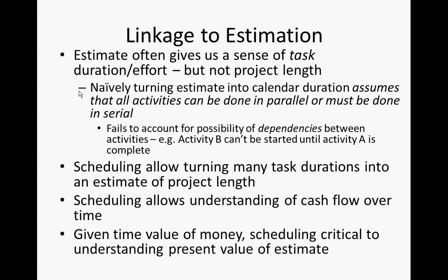If I were to say, well, okay, we can complete that incremental deliverable 2 within 11 hours, 4 plus 2 plus 1 plus 4, would that be accurate? Why not? What is it missing? Okay, so it's missing the fact that one task might have to be done before or after another.